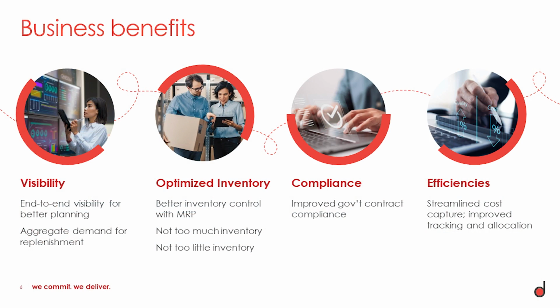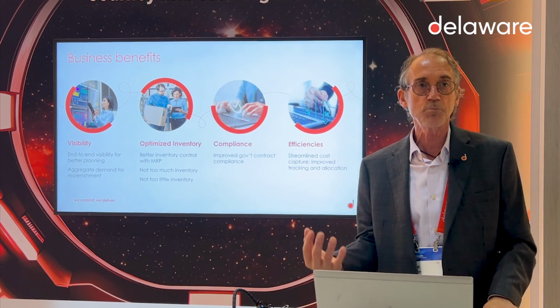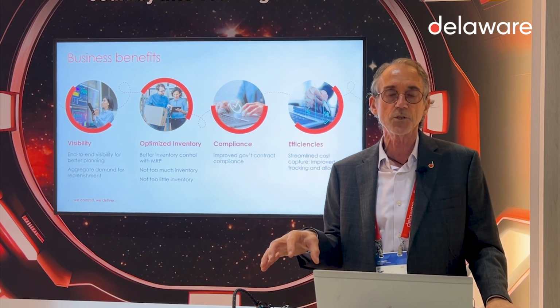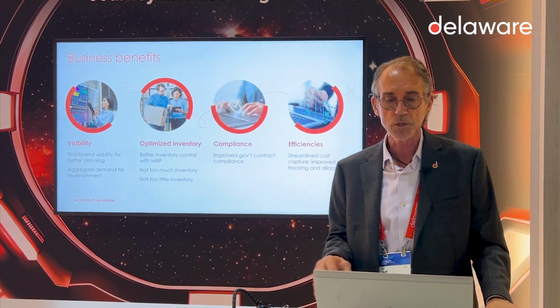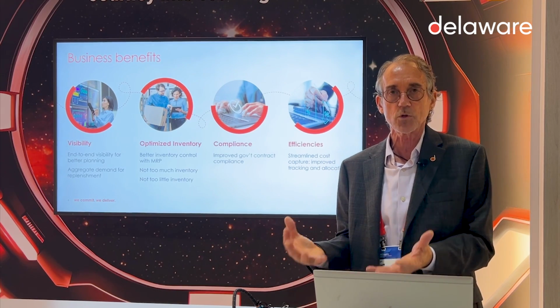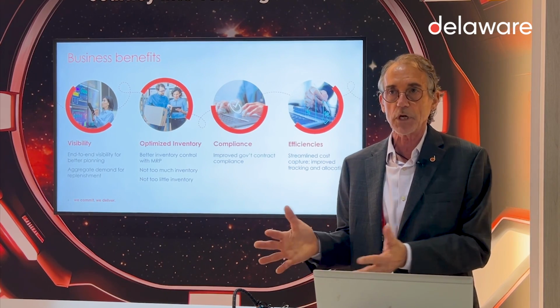Compliance. I'm able to peg my costs or the materials demand back to those operating WBS elements where they're going to be consumed. I'm able to peg my material, my resources, my labor back to those same operating WBSs too. And so I can truly report on the actual costs for any given project.